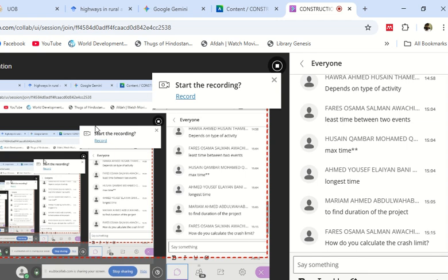So instead of 3 days for one excavator, I can use 3 excavators for 1 day. This is a very simple example, but this is where your experience and judgment come into play. Can I keep 3 excavators on my site in a day at the same time?